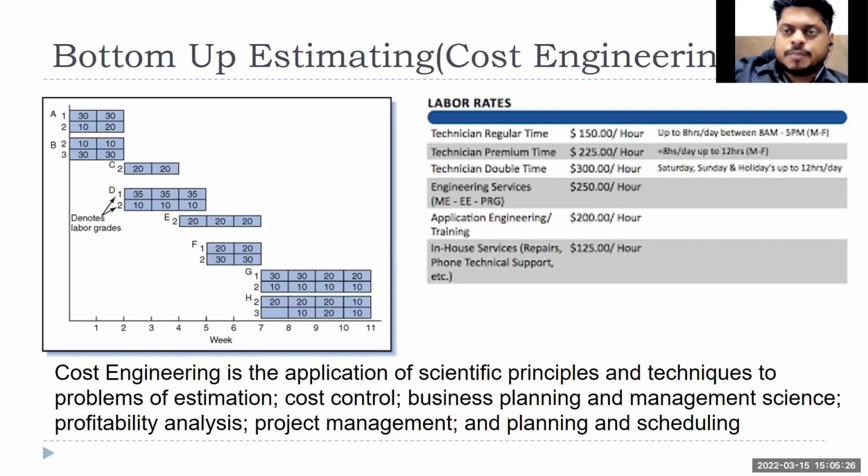But to get to that point, to complete the 20 percent of work, which is worth 200 crores to the government, you might have to spend at least 150 or 180 crores, right? Where will you get that money? It is not necessarily in your bank. So there you need help from the project finance team, right? The finance members who are working with your team will look into different opportunities where they will finance. So project finance comes into the picture.